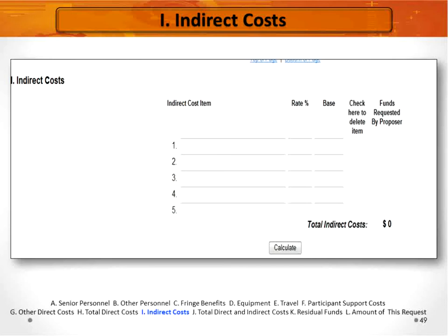It is important to pay close attention to the impact that indirect costs have on your project budget. Indirect costs are included in the total grant amount. This amount is not in addition to the amount that you're requesting for the project. So don't get tangled up about this. Let me share just a couple of real examples.